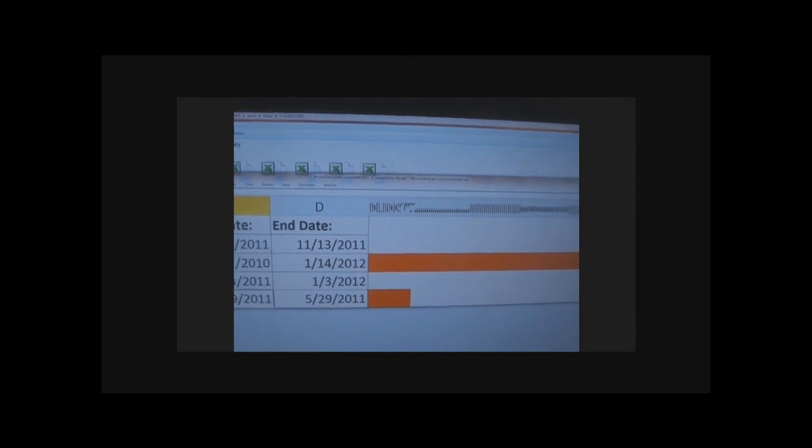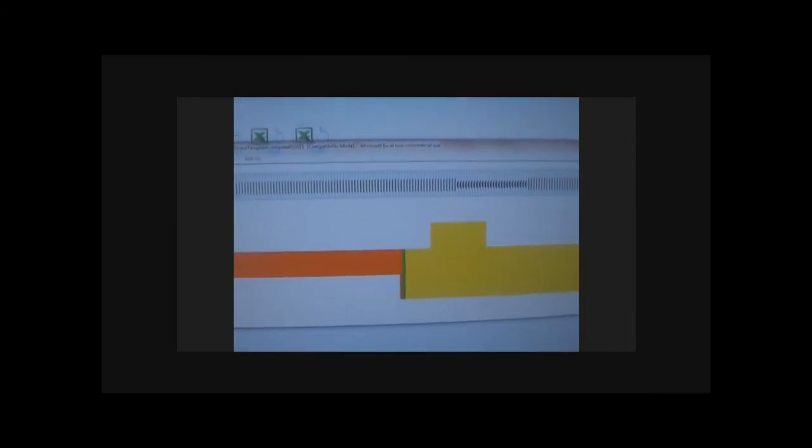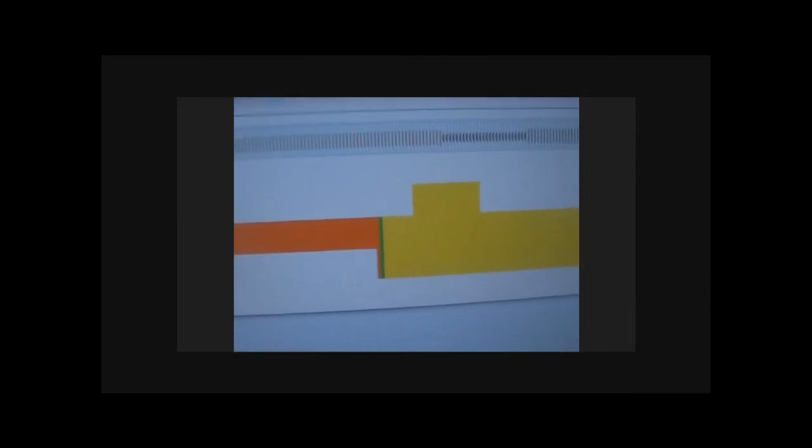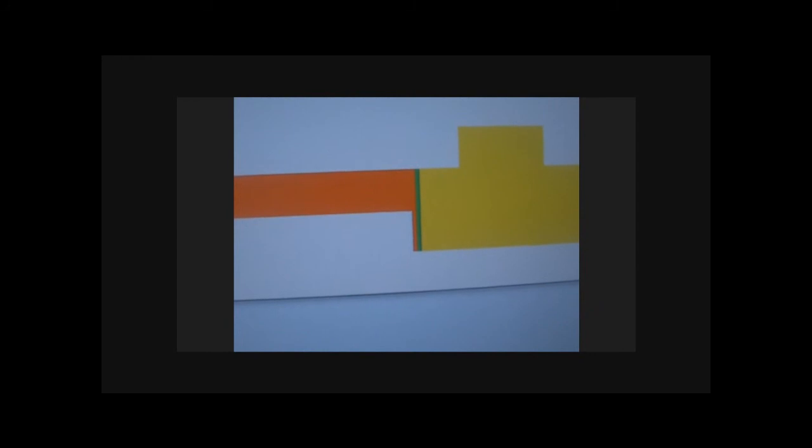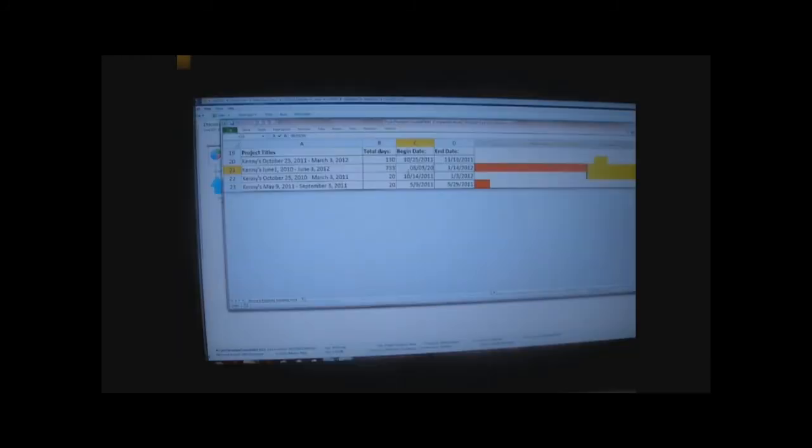And now you see mostly yellow. But if I zoom in there, you'll see a little orange right before the green. That means there's one day prior to today's date that the project started. You can see a little orange there, and then you see the green line which represents today.